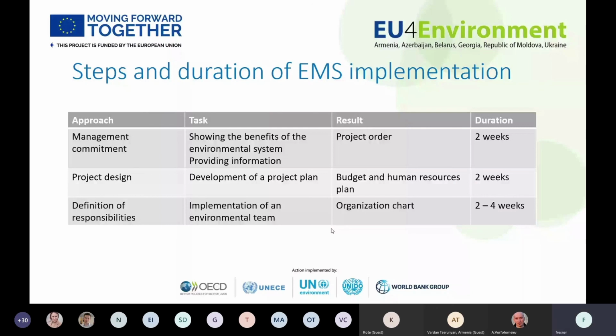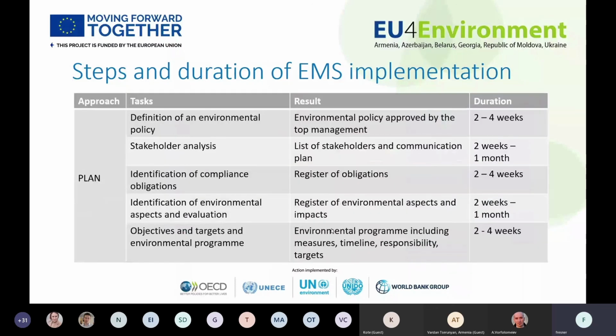We have some examples where this took much longer, but I'm not elaborating on this here. Then project design, a proper plan of activities following maybe the model which we proposed in this presentation, will take another 2 weeks. Then meetings, definition of responsibilities, collecting an environmental team will last anything between 2 to 4 weeks.